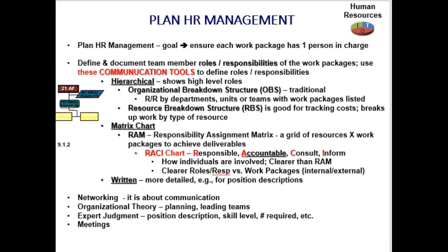Now, there are several other ways you could manage your resources to define roles and responsibilities. So once you have the work, you need to define these roles and responsibilities to do them. You could do some sort of hierarchical organizational chart. We just called it an OBS, the organizational breakdown structure. Or we could use a matrix chart. A RAM is a type of matrix chart. That's called the responsibility assignment matrix.